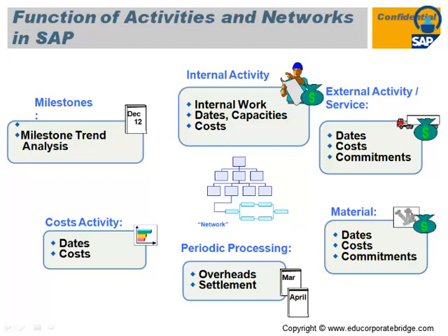For that service, a service master is created in the system through the MM module. Like the material master, there is a service master, where you have to maintain some prerequisite data through the MM module, and later on you will use it against that particular service activity. Against the material, you have to capture the date, cost, and the commitment. Commitments, as I told you earlier, are nothing but your purchase requisition and the purchase order.